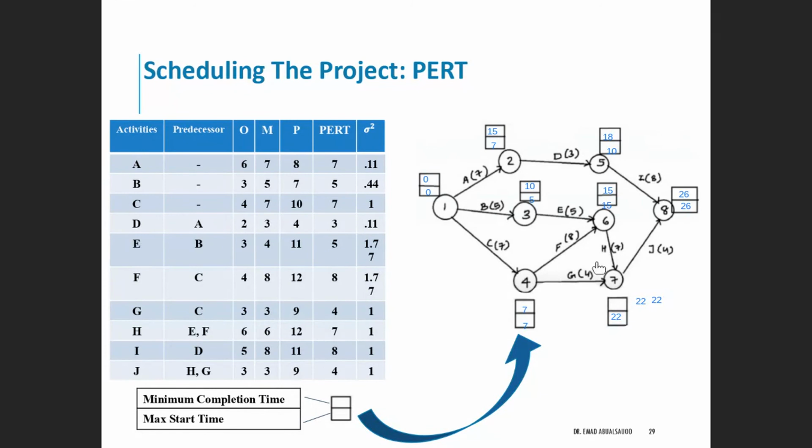Which one should I choose? I start to subtract the 22 minus 7 بيعطيني 15. Or I subtract the 22 minus 4 give me, لا عفوا, 18. Yes, 22 minus 4 gives me 18. ال 18 أكبر من ال 15، فأنا أروح للطريقة الأقصر في الرجعة.